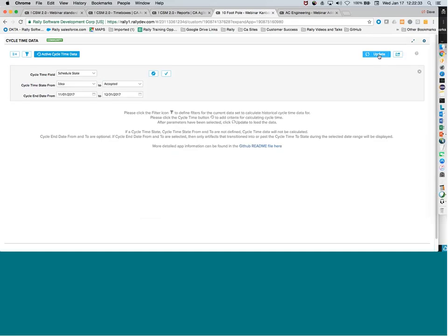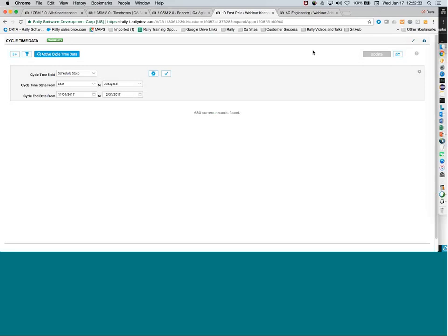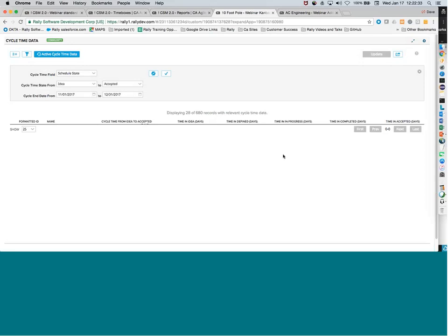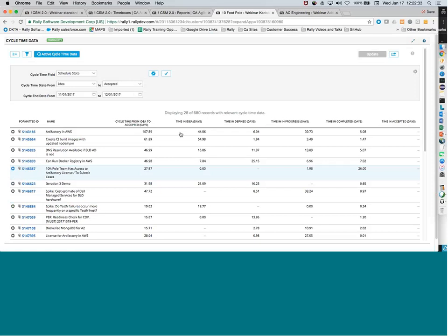What the report shows you, and this is a standard report, is available under the Track Team Status option. And what it shows you is for any given team member, they can identify what their capacity is for the sprint. If they happen to work on multiple teams, they would allocate their time across those multiple teams. And then as work is taken on by that particular user, we can see how that measures up with what their capacity is. So when you see red, obviously that's an issue.